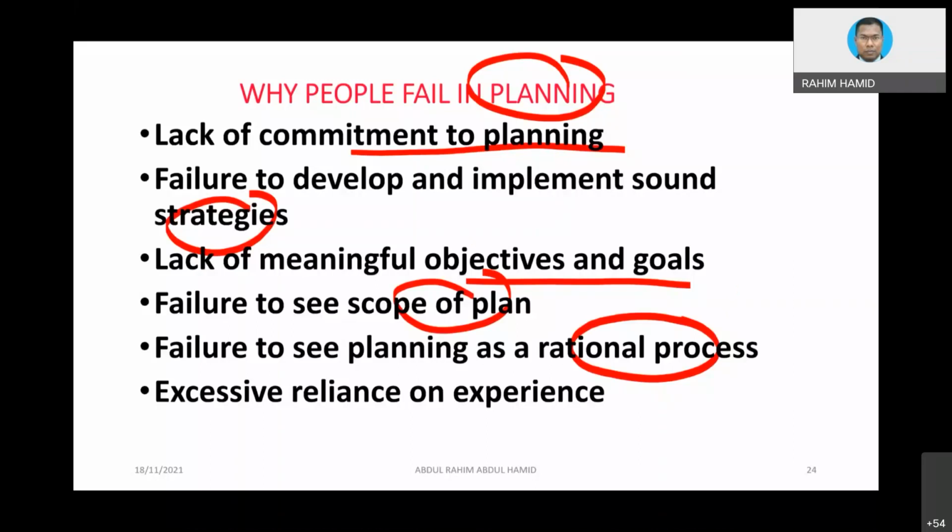For instance, that's why normally in Malaysia, if you want to bid for a tender, you are invited for a site visit on a specific date. Sometimes the requirement mentions that the site visit is mandatory. Why is it mandatory? If you fail to attend, then you can say bye-bye to the tendering. Don't even send your tender. You are not going to be entertained.